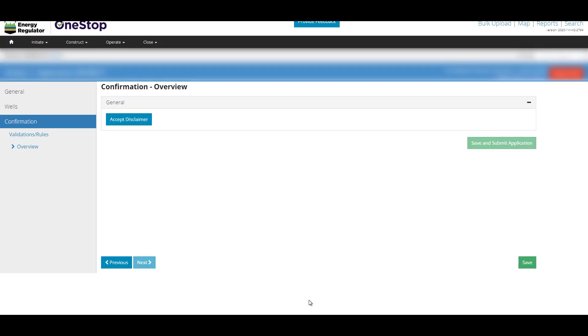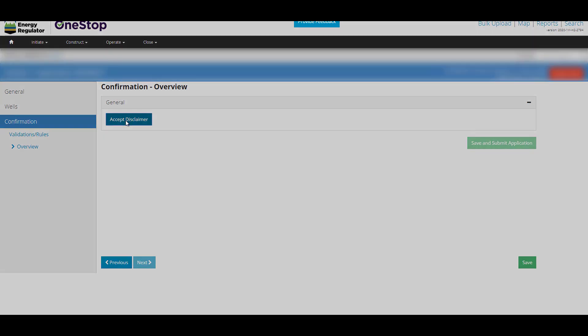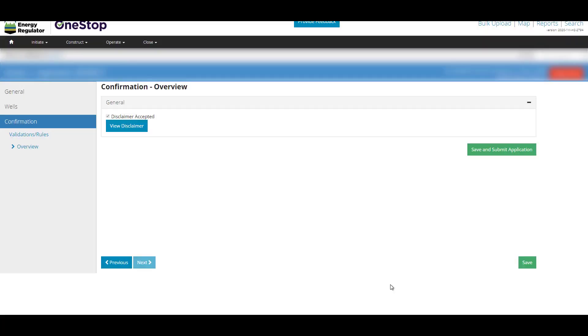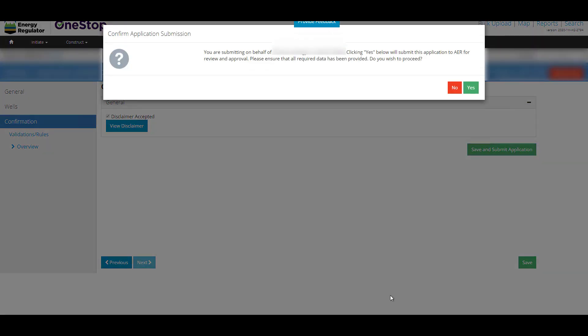The Declaration and Disclaimer statement appears as the final step in submitting your application. Click Accept Disclaimer. Then click I Agree to proceed. When you select I Disagree, the application is not forwarded to the AER but remains as a draft application. Click Save and Submit Application to register your application with the AER.